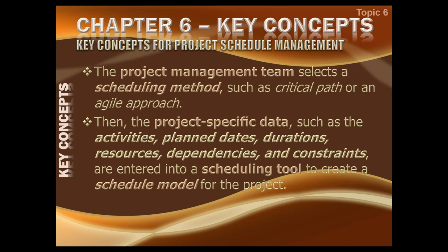Now this schedule model is highly versatile. It will keep changing as the data changes, and data changes a lot, because we are not really sure about any data we have estimated. Say I assume that this activity will take 2 days, and someone says no, it will take 10 days. So I'm not really sure about how much time it will take. What if this activity is critical? How can I base all my decisions on 2 days? So if I decide to change it to 3 or 4 days, then the whole of my schedule will be shaken. It will form another shape. A new version of the schedule model will come out of it.